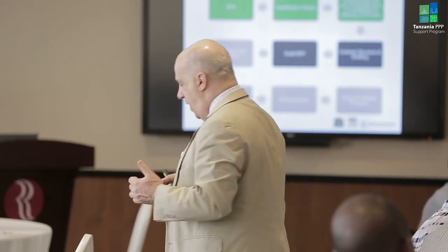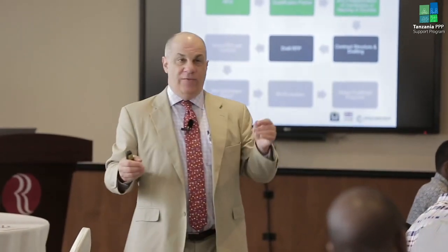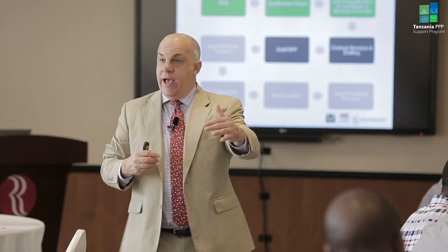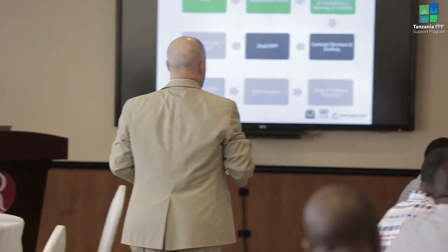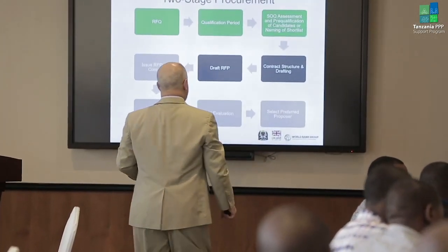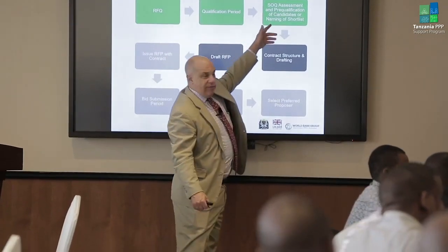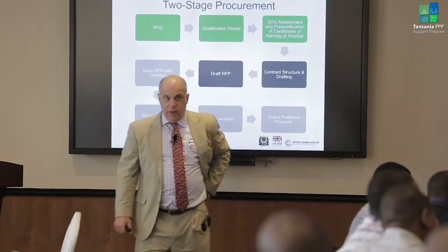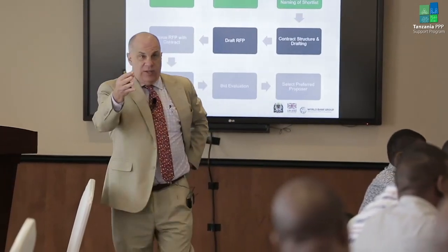If they have only a 1 in 12 chance of winning, and they're going to have to invest that much money in putting the proposal together, do you think they really want to take that chance? Their odds are not very good. So one of the things we want to do, and we don't always do it, by the way, but it's a good practice, is have a short list of candidates, as you suggested.